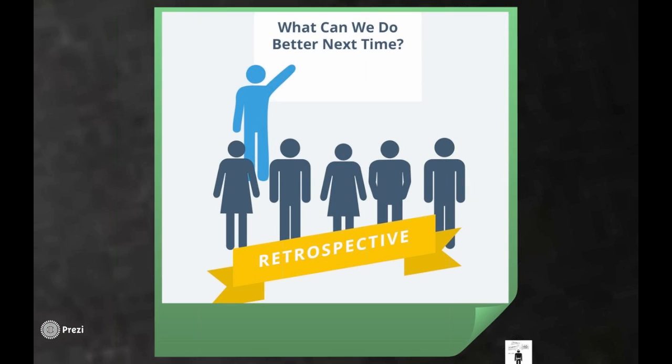So before you have your sprint retrospective, there's another Scrum activity. It's called a sprint review. It's basically a demo where you demonstrate what was completed during the sprint. Typically what our team does here is, they all get together in the room and they have a projector and they show, this is what was completed, this is how it works, these are some things that we've noticed. Typically the stakeholders are present, the executives, and you go through and demonstrate what has happened.